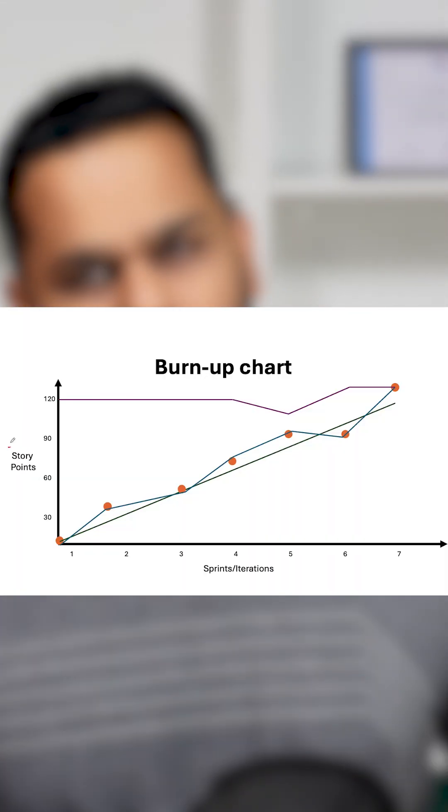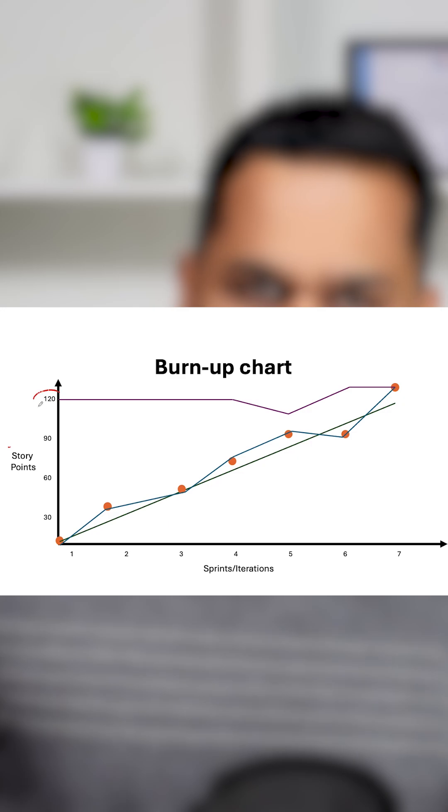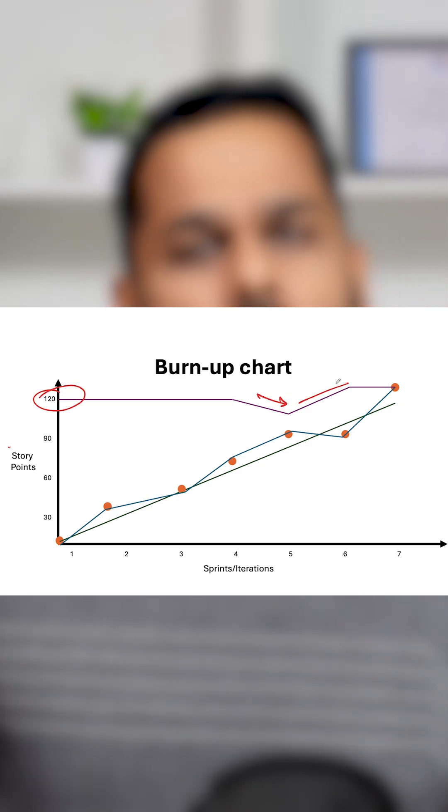Additionally, what we see in a burn-up chart is a scope variation chart as well. Sometimes, towards a release, we may see some variation in user stories — some addition of user stories, some deletion of user stories. So my scope, the total 120 story points that I am supposed to complete, might go down or up depending on the scope changes. The burn-up chart helps us reflect that as well, which we don't see in a burn-down chart.